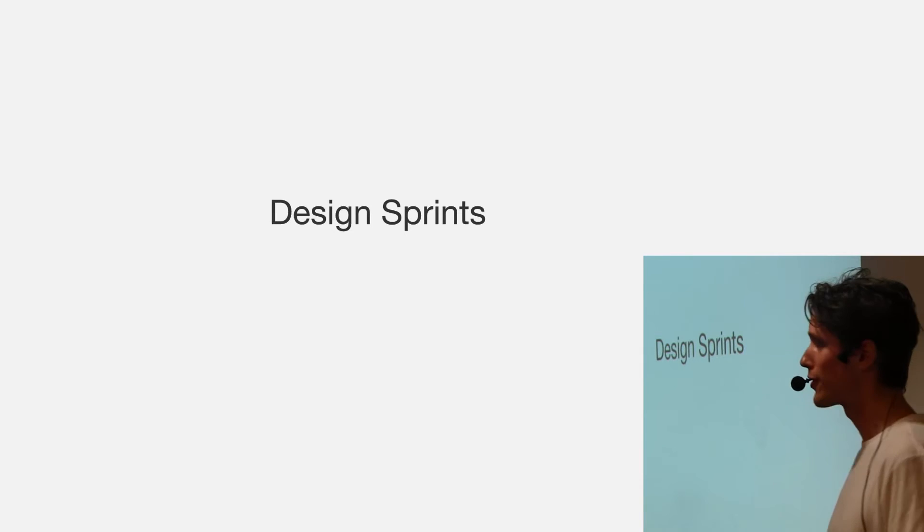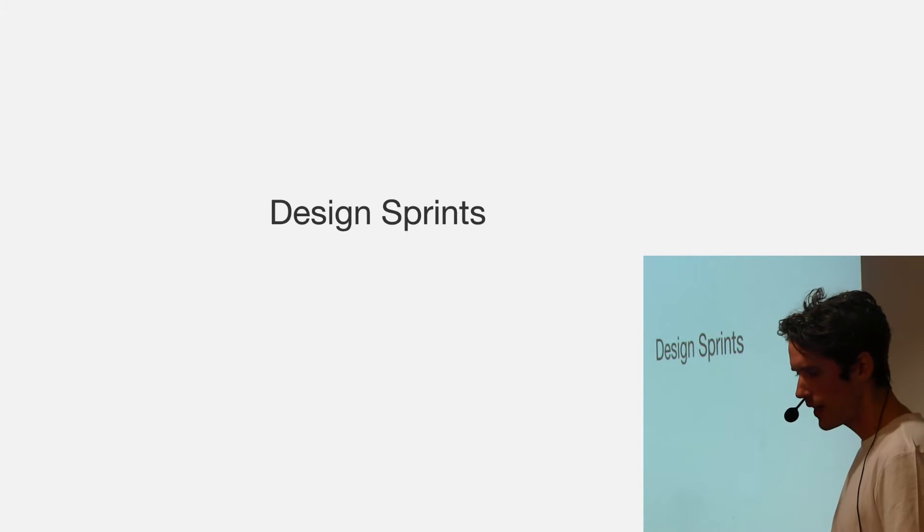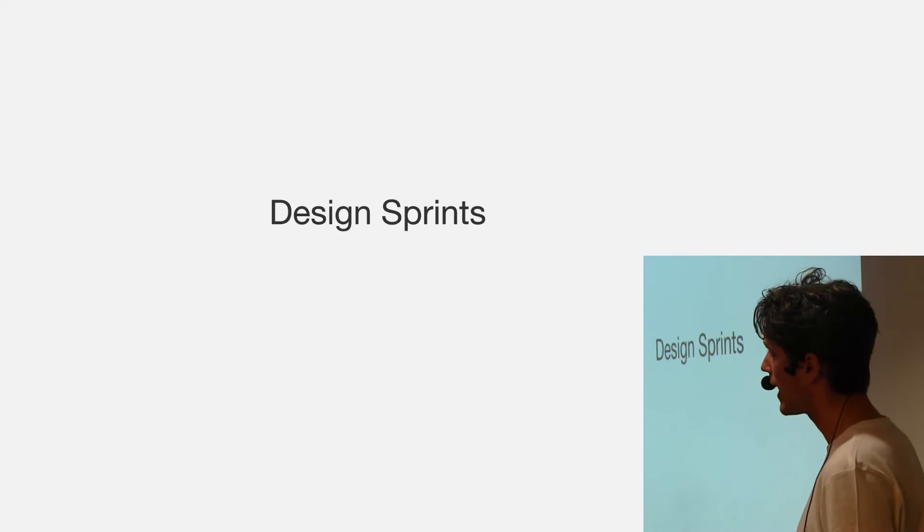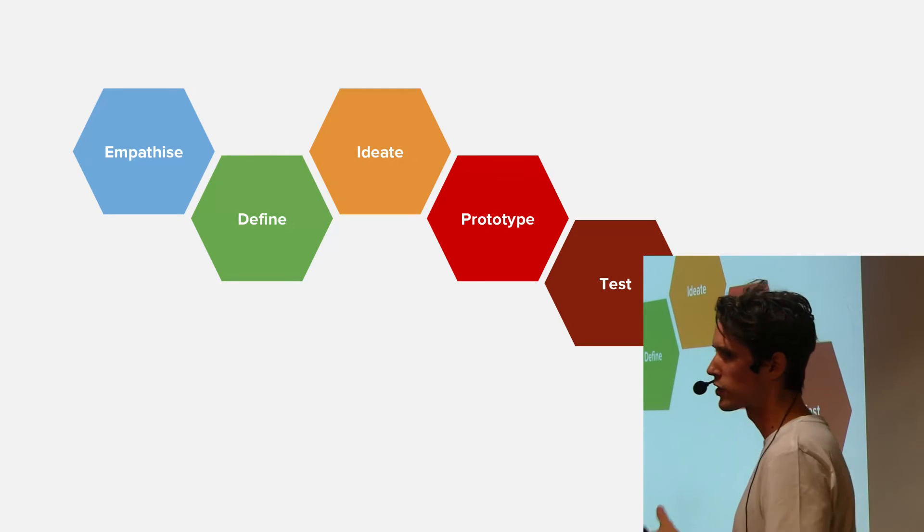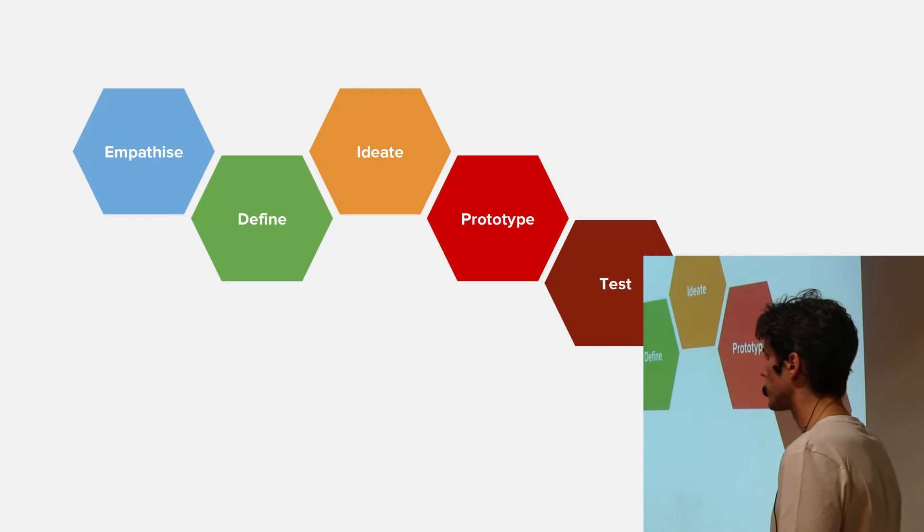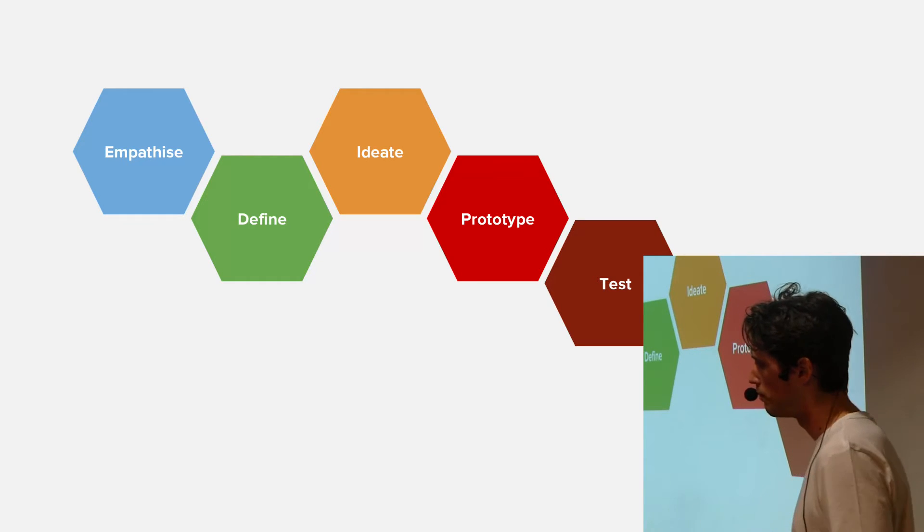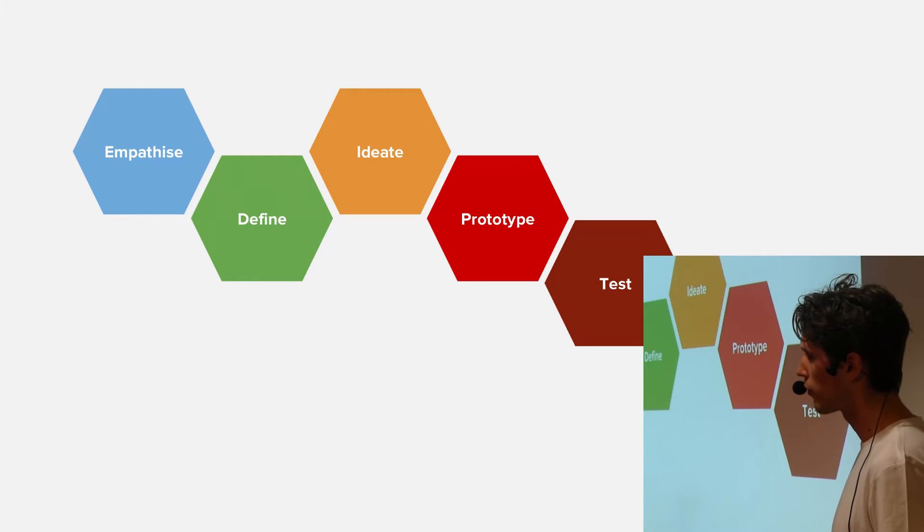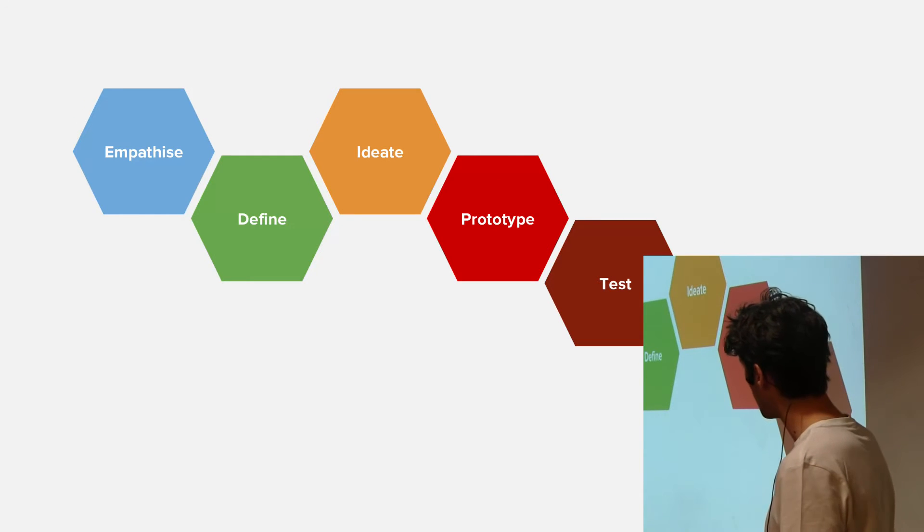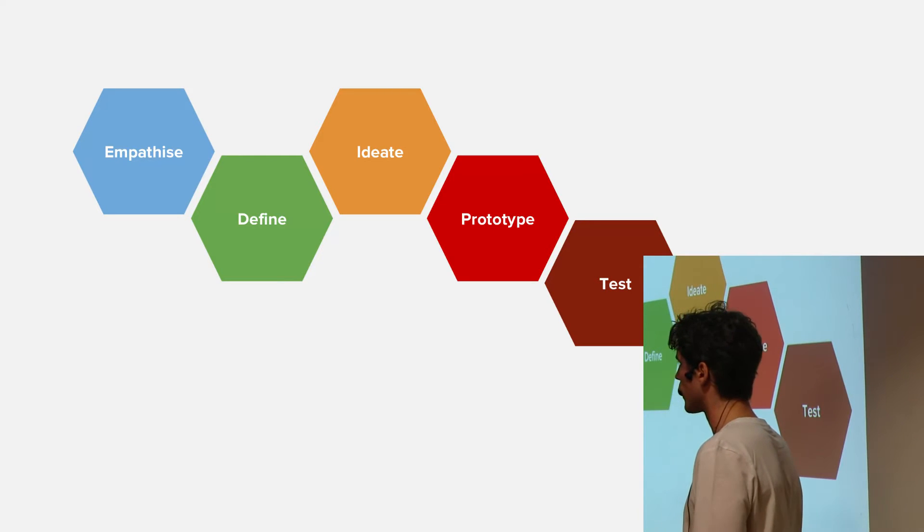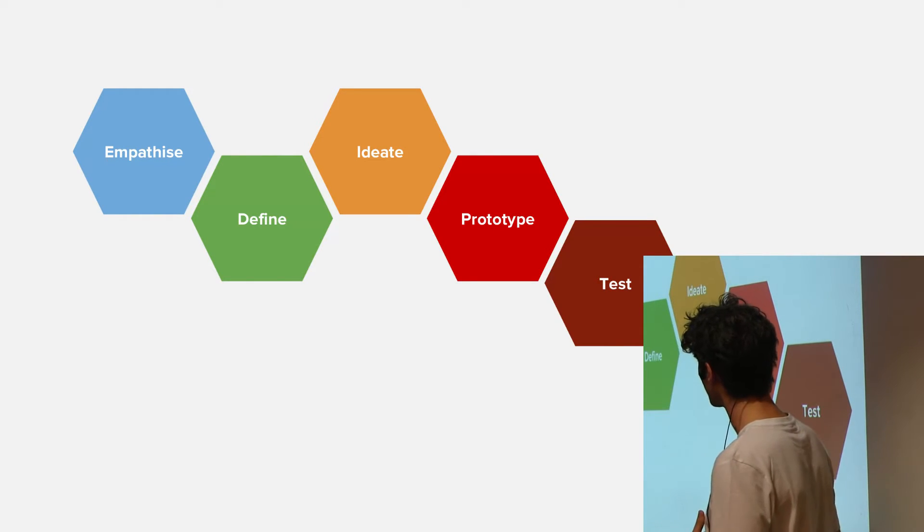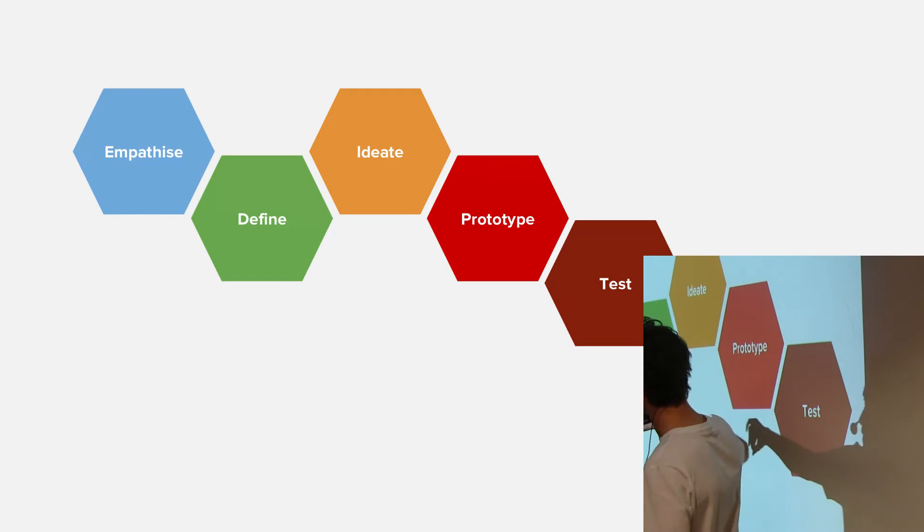So I looked into that and how we could solve that. And I came up or I found basically the concept of sprint zero and sprint zero is a great idea. For those of you who don't know what sprint zero is, sprint zero is the principle that when you build a new feature, you kind of do a pre sprint to that. And you figure out everything that you need to build, the stuff of the feature of the Epic as it were, in the following sprints, but that only happens one time. So after that feature is built or halfway through that feature, if you need to do like more research and like really need time to get through that, like there basically isn't space. So there's that problem. And there's the problem that there's no actual input from UX into dev or into product. Product comes up with an idea and basically pushes that onto you. And there's no feedback loop happening there until the thing actually gets shipped. And then you get that feedback on a larger scale, but that takes very long.